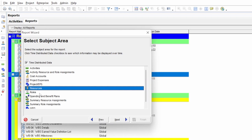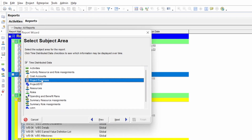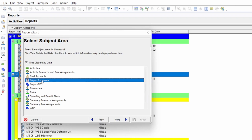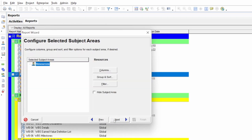We have to select which data we need from the program. There is 'Project Expense' and there is 'Resources.' Sometimes planners assign the BOQ cost in Project Expense, as recommended by many consultants. Sometimes contractors assign resources as a separate non-labor resource in the resource tab. In the program I'm sharing, the cost is assigned as a separate non-labor resource, so we select 'Resource.' If your project uses expenses, select 'Project Expense.' Then press Next.